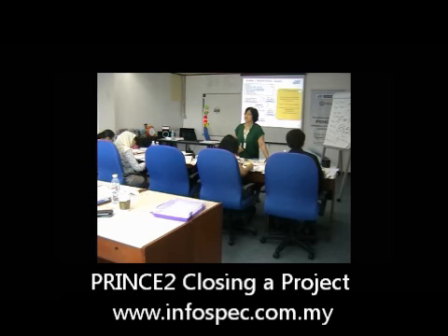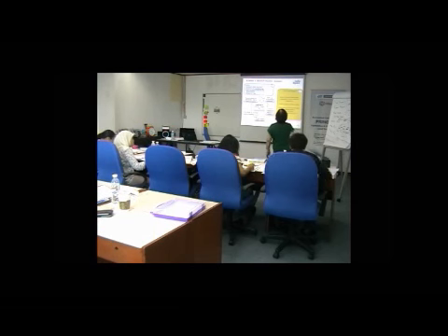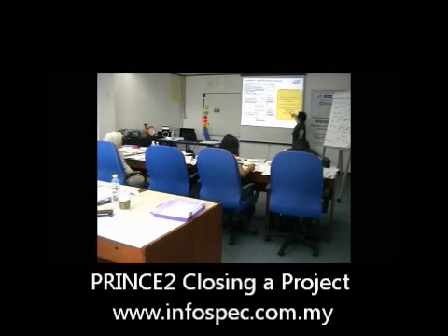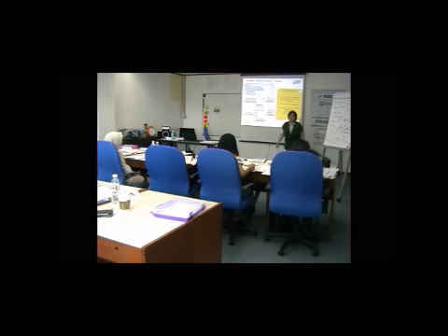As part of your end project report, you also incorporate the lessons report. Unfinished work, ongoing risk, potential modification, all this will go to follow-on action recommendations.